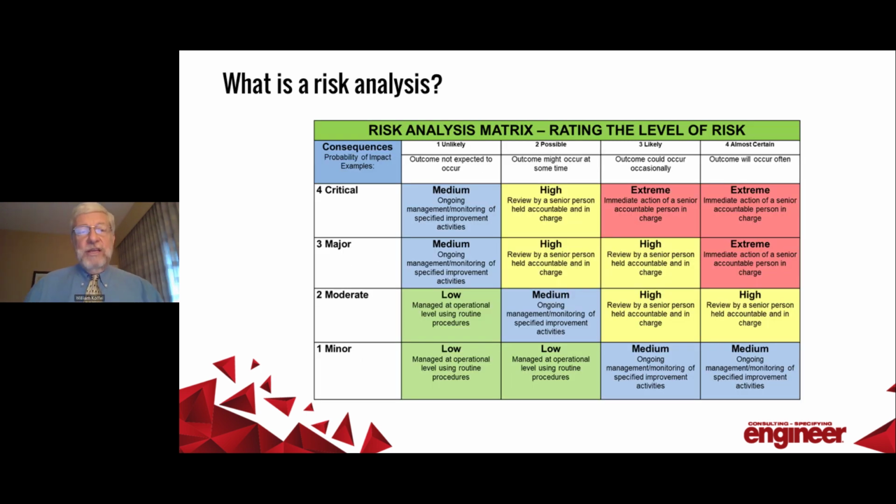Now, many times we'll look at this from a risk analysis perspective, where we want to try to identify what the risk is, and we'll look at various scenarios and we'll identify the outcome, the consequence of that event occurring. We'll look at the likelihood of that event occurring. And now I can present to the owner, well, here's some scenarios we should look at, and is that level acceptable? Or is that outcome acceptable?